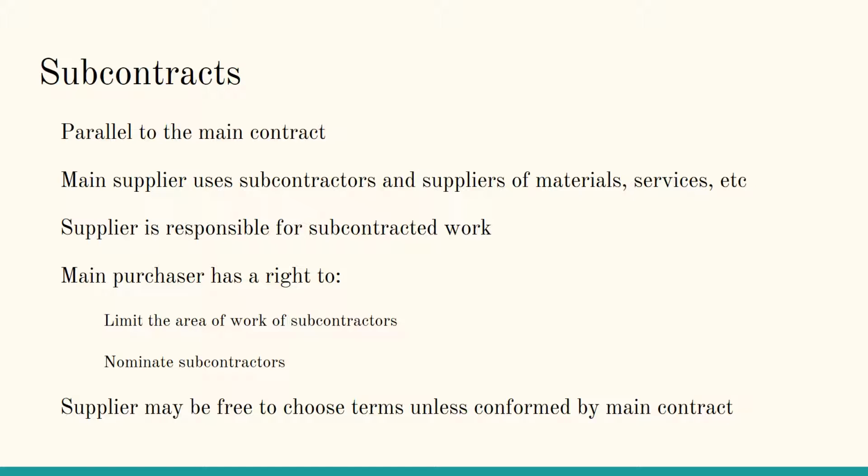The supplier may be free to choose the terms of subcontracts, or, alternatively, the terms may be required to correspond back-to-back with those of the main contract. Purchasers may also reserve the right to nominate subcontractors. Contracts therefore require specific clauses to manage specific risks imposed by nomination.